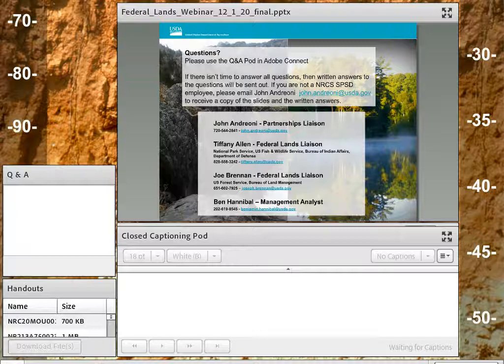So let's send that to Joe. A dynamic soil properties project would need a working agreement of some kind, and that could be either a statement of commitment that's attached to their national MOU, or there could be a contribution or an interagency agreement. But I think generally you at least would need a statement of commitment to outline mutual objectives with the partner and other agreed to items.